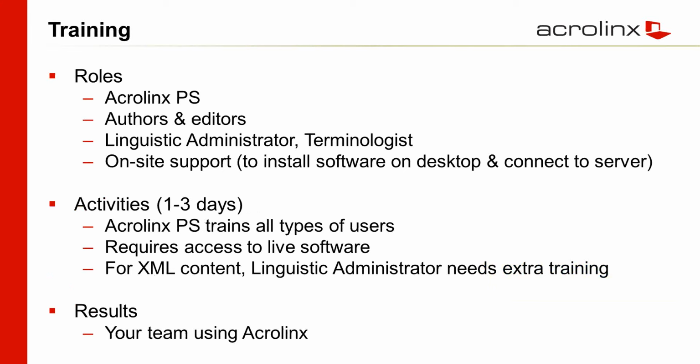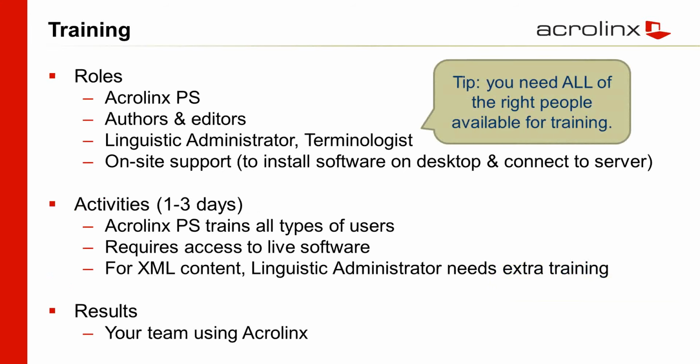Okay. And then the next step is training. So the software is ready. What we want to do is train people at the point that the software is ready to start to use. Now, use means test. Use test data, use your own data, but we want to combine training and testing together so that there's instant payoff for that training.